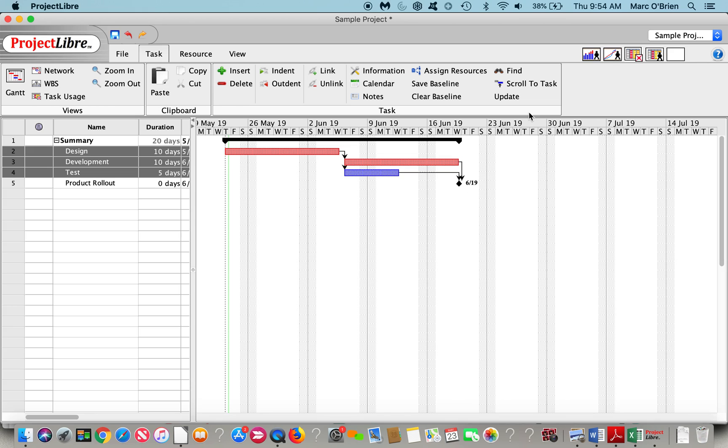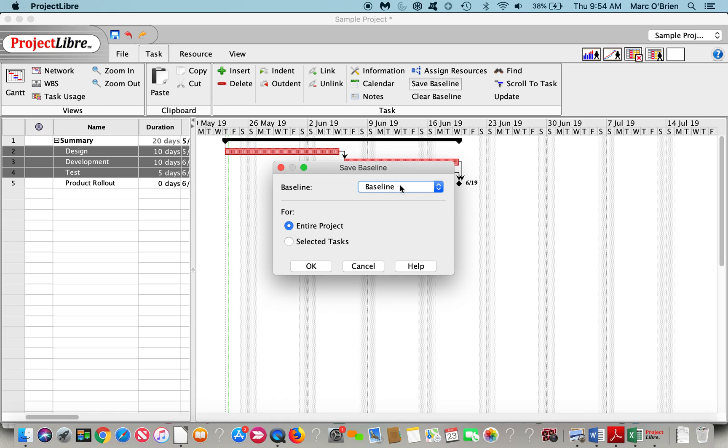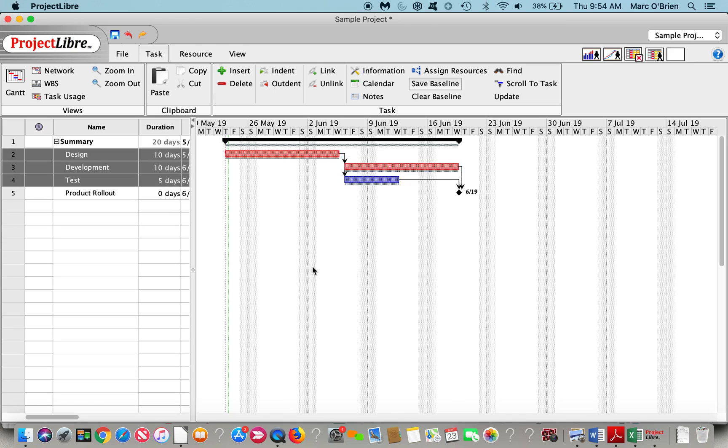I've got the durations, I've got the linkages. I could come through and save a baseline. You can save an unlimited number of baselines for the entire project, or if you want to select tasks to baseline. And you can see the baseline bar shows up down below.